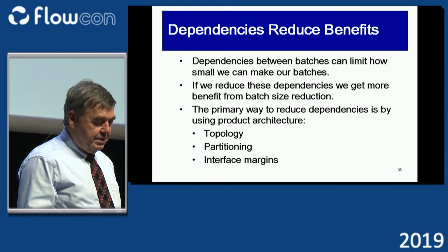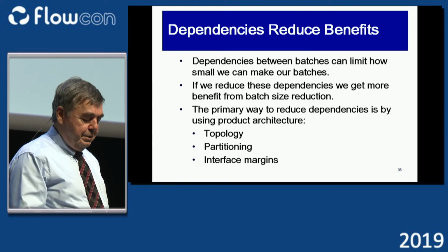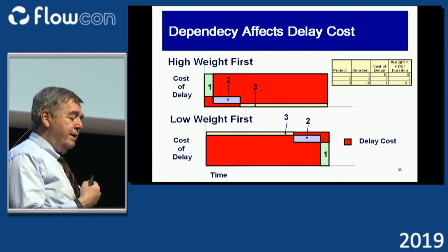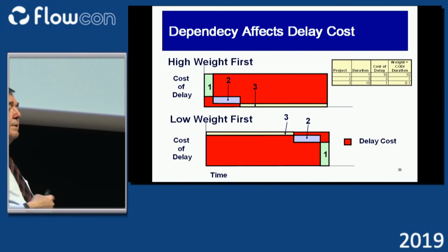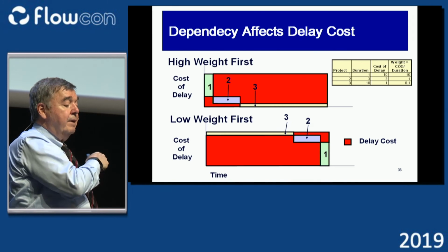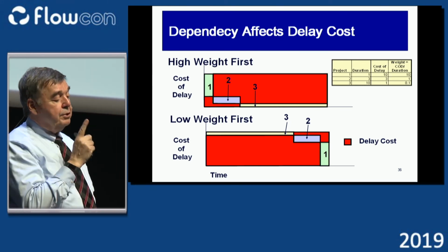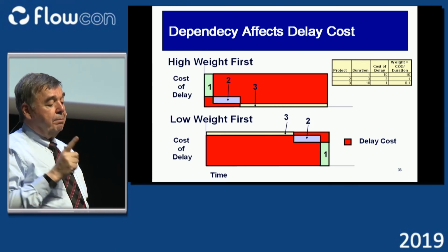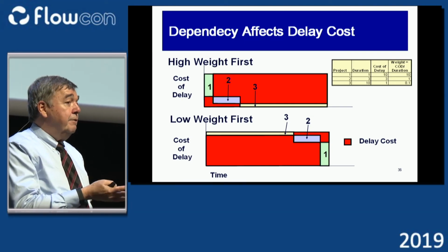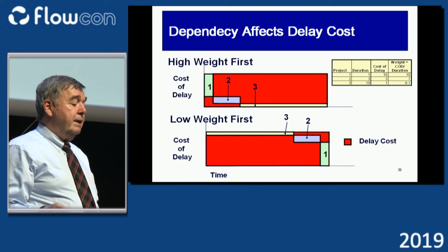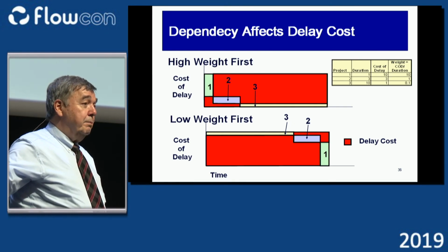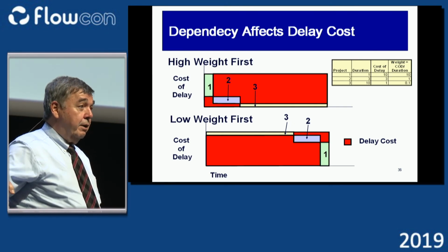And on this next slide, there's a whole bunch of things we do. I'm not going to go into that. But on this next slide, I'm depicting what happens to that cost of delay figure I was doing if I have to introduce module 1, 2, and 3 or project 1, 2, and 3 at exactly the same time. Because I get no advantage from completing project 1 early if I end up having to wait to put it on the market until project 2 and 3 are also complete.